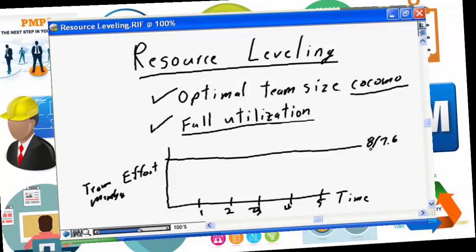If you're dealing on a week basis, it's going to be 40, or again, the appropriate reduction down to 35 hours of available time for the team member. Or if you're working on a month basis, it's going to be 22 average days per month, or again, reduced to the appropriate number of 18.5 available days for your project per unit of time, day, week, month.